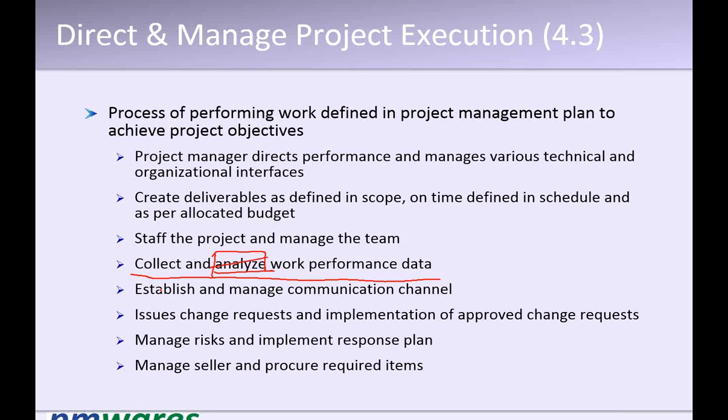See, there are two types of reviews. One is proactive and another is reactive. Proactive ones are part of the execution. So we say quality control is not there, but quality assurance is part of the project execution. So basically solution designing and the review both are part of the project execution.